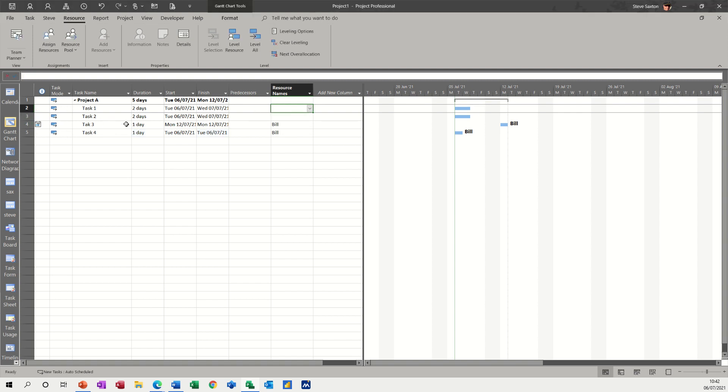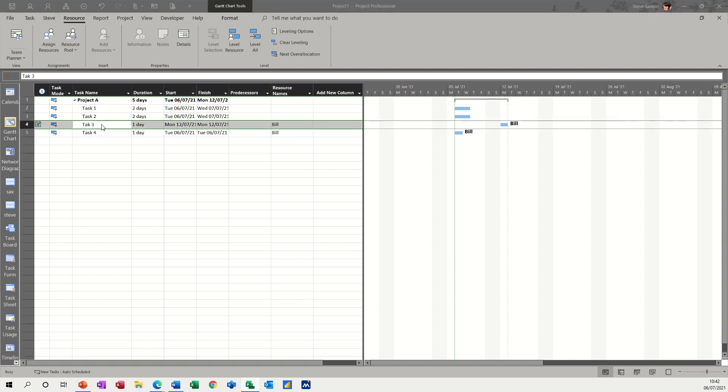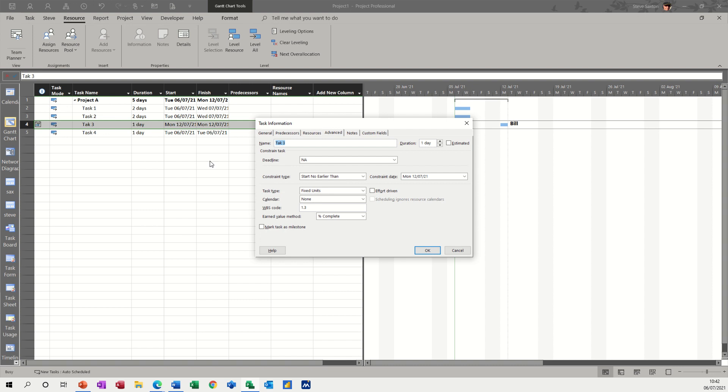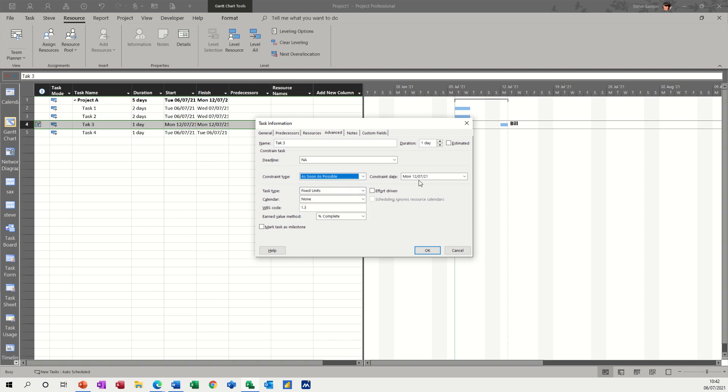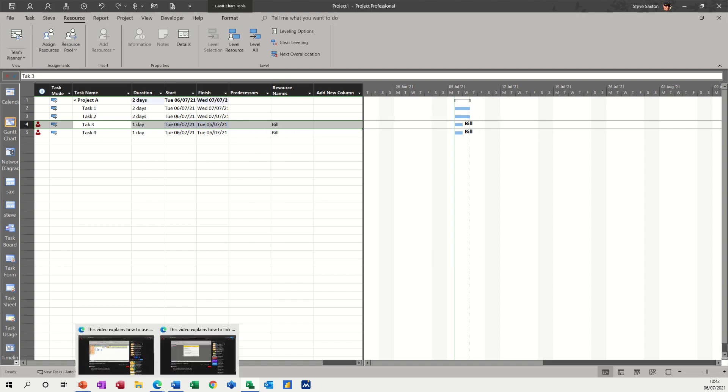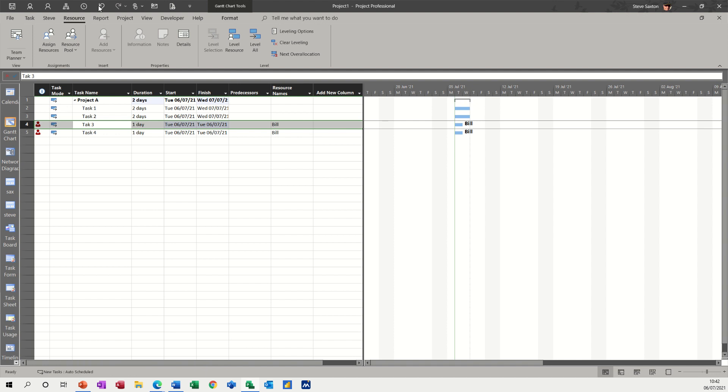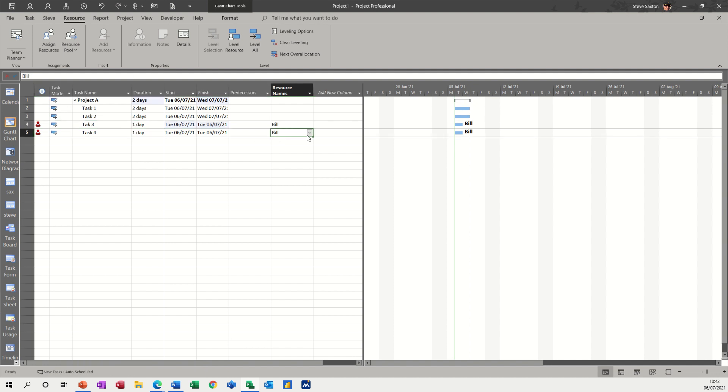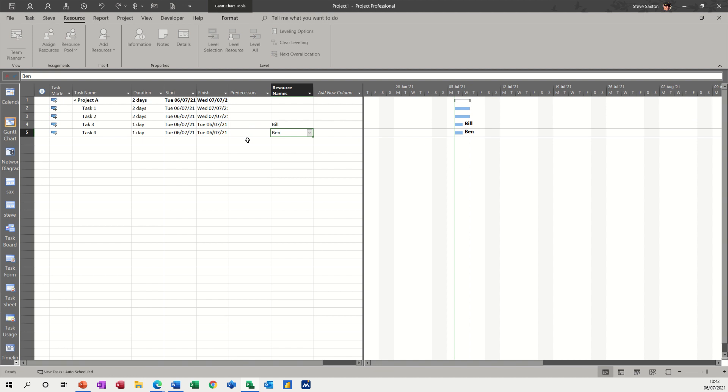And because we've been messing about with the availability, this has put a constraint on there. If you want to, because I've now got rid of all that, we need to put these back to the default options. Otherwise, that gives this task a bit more priority in terms of resource leveling if you get onto that stage. So now we've got to double up again because that's just put that back to the original date, which was a Tuesday. So I'll just get rid of Bill off this one and put Ben on that one. And that clears everything up.